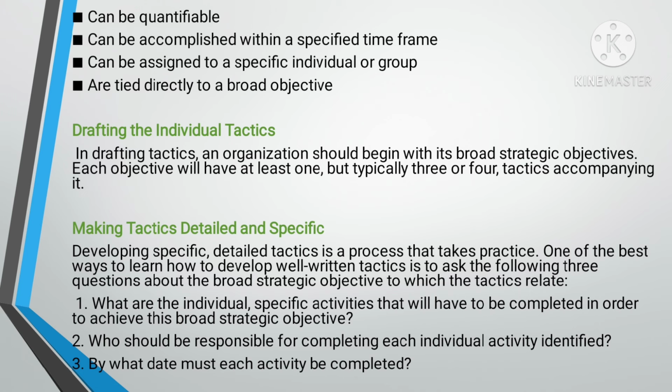One of the best ways to learn how to develop well-written tactics is to ask the following three questions about a broad strategic objective to which the tactics relate. First, what are the individual specific activities that will have to be completed in order to achieve this broad strategic objective? Second, who should be responsible for completing each individual activity identified? And third, by what date must each activity be completed?